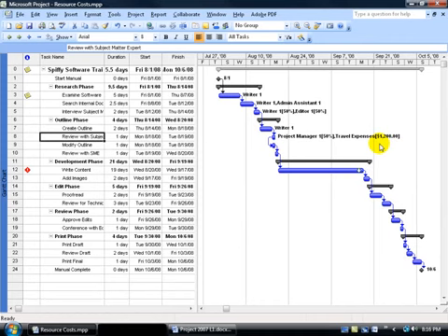Now I have a question. Why did it put the $1,200 here, the expense or the cost for this cost resource, and not for the others? Well, basically, if you enter in all your resources, then assign all the cost, and then you come up here and then assign your resources, it'll go ahead and enter in the cost. But because I already had these resources assigned before I entered in the cost, they're not going to be entered or displayed over to the right. So that's a good learning example if you want them displayed to the right here. But it's still keeping track of the cost.